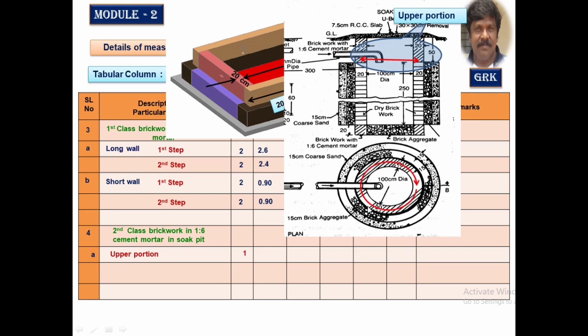Calculate the circumferential length of that. We are not finding out the area, we are going to find out the circumferential length of this one, the center mean diameter, and circumferential length is given by pi d. D is, as I said, 0.2 by 2 plus 1 meter plus 0.2 by 2, it is 1.2 meter.